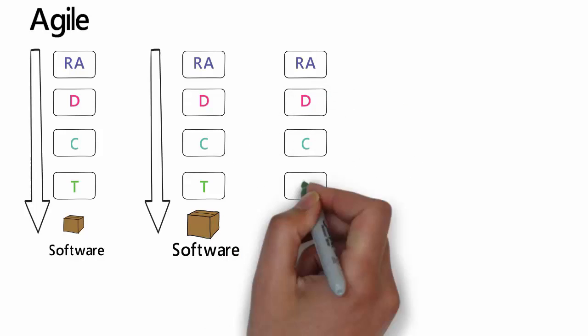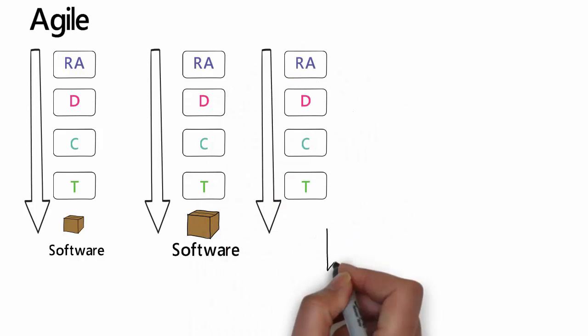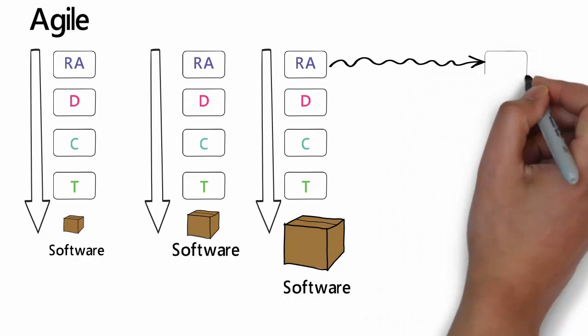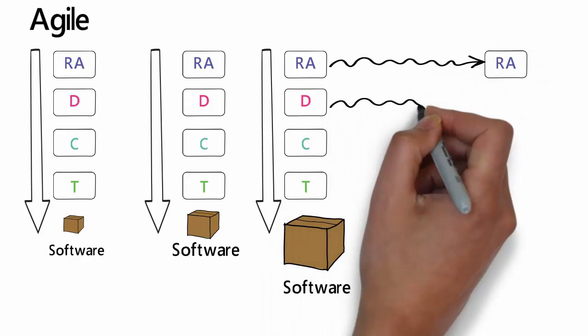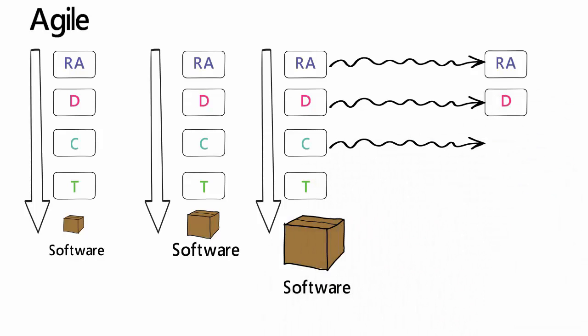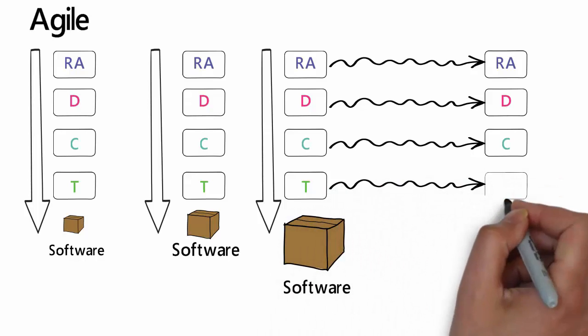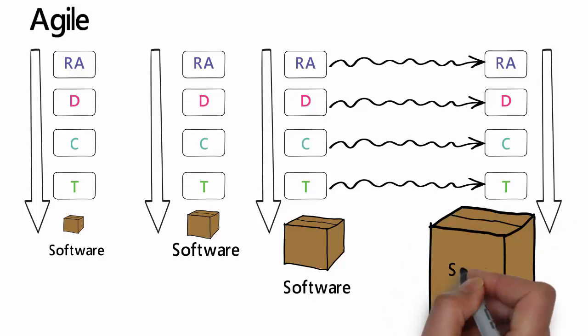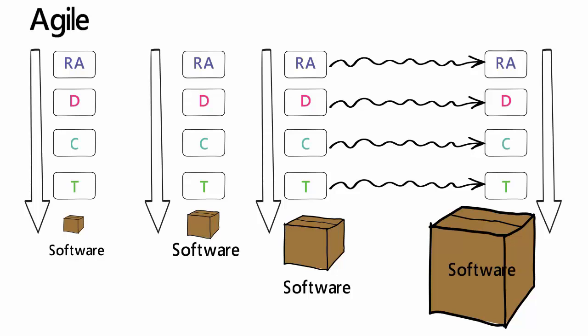This completes one iteration. Each iteration delivers a usable software for the customer. By the completion of one iteration, customer will come with the next set of features to be addressed in the next iteration. The customer has the flexibility to change or reprioritize the requirements for each iteration based on the changing business environment. In this process, software development happens in an iterative manner.